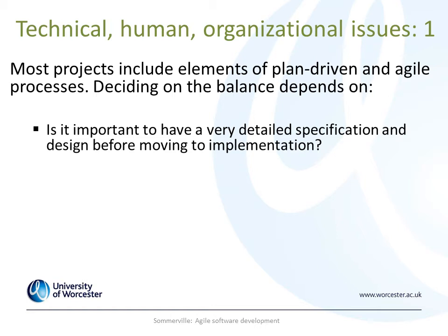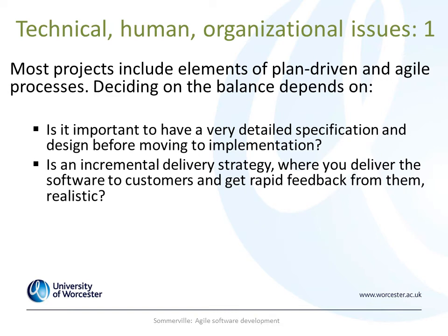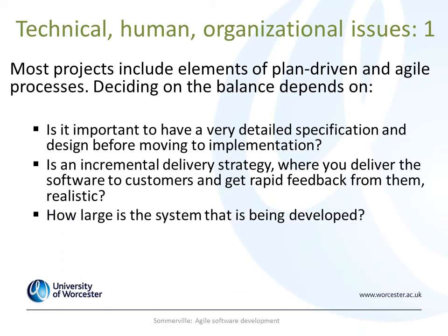Is an incremental delivery strategy, for instance, where you deliver the software to customers and get rapid feedback from them, realistic? And if it is realistic, fine. Consider using Agile methods. How large is the system that is being developed? Agile methods are most effective when the system can be developed with small teams who can communicate informally.